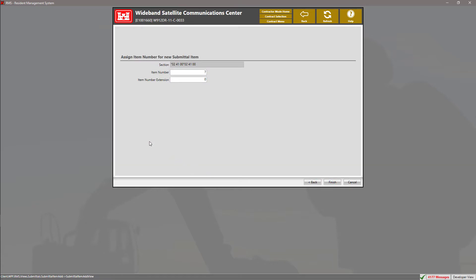Here, we have two input fields for the submittal item number and the extension. These fields are used to uniquely identify the submittal. RMS automatically generates the next submittal item number. However, the user can still change the number when creating a submittal item.